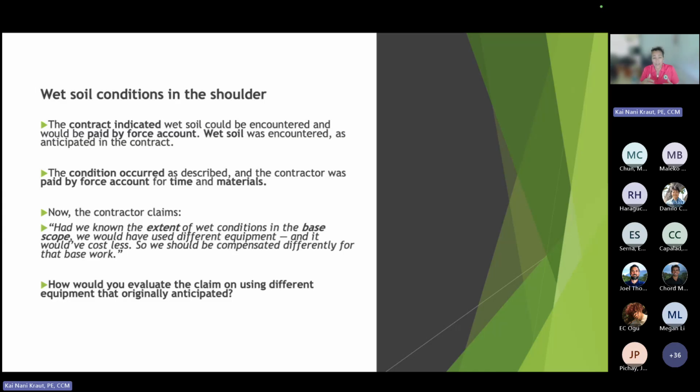If they said, make sure you do this, if they said there might be whatever the condition is, then the plans are trying to give you notice of it, and then you would have to look at, does it materially differ? Because I think there is an obligation on our side as the owner to put out the traffic control and go do that investigation and annotate something in the plans.